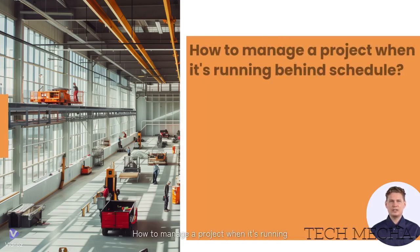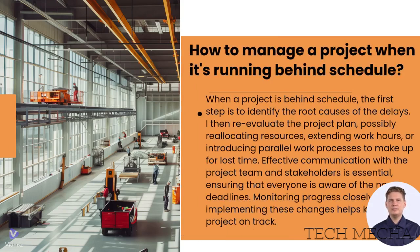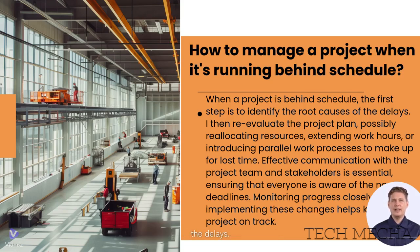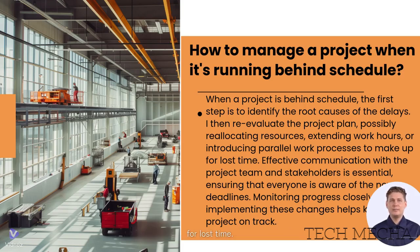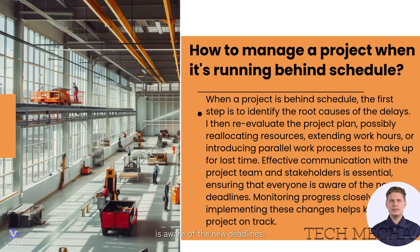How do you manage a project when it's running behind schedule? When a project is behind schedule, the first step is to identify the root causes of the delays. I then re-evaluate the project plan, possibly reallocating resources, extending work hours, or introducing parallel work processes to make up for lost time. Effective communication with the project team and stakeholders is essential, ensuring that everyone is aware of the new deadlines.